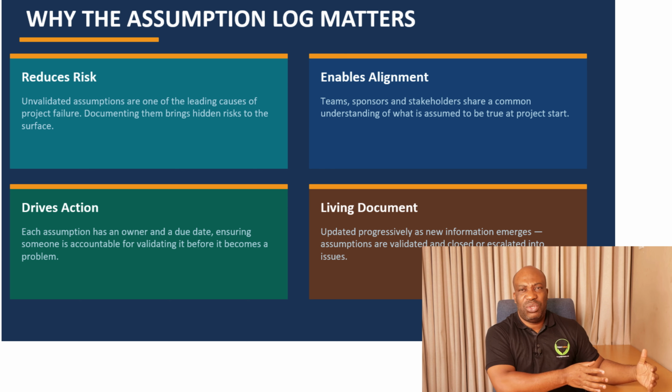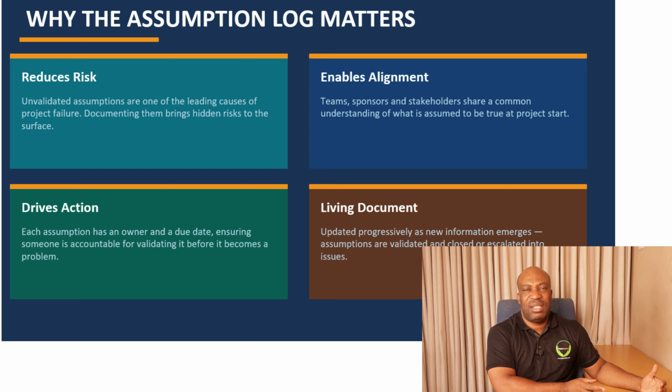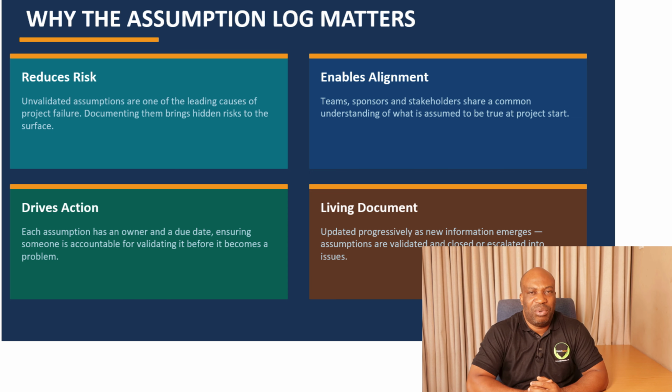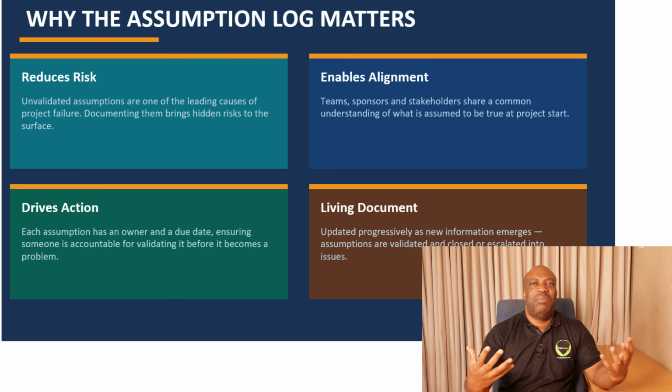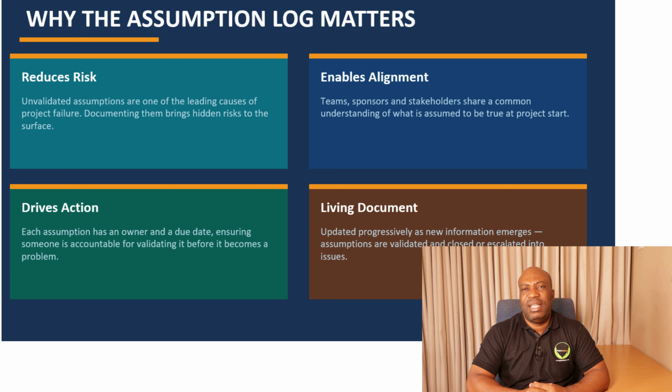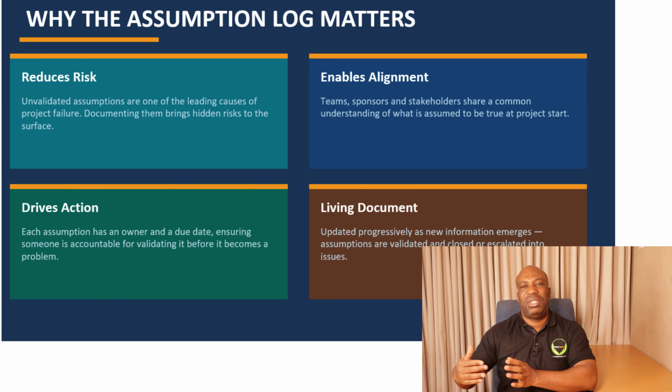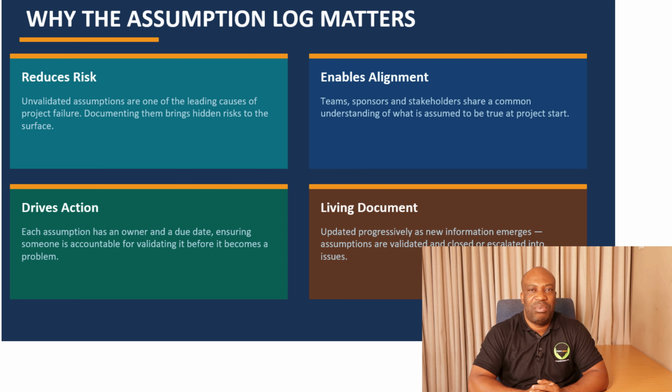You might assume that the old servers, or old infrastructure, are going to be used as part of the new project. However, during the project, you might discover, or you can be advised by the technical team, that there's a compatibility issue, which means the previous infrastructure or the servers can't be used in the new project.